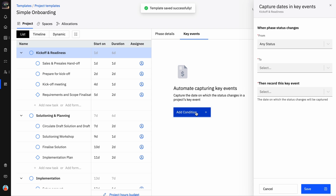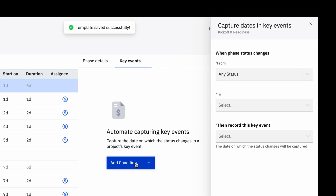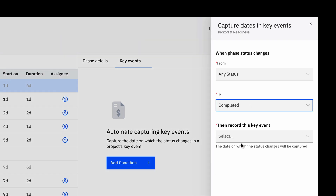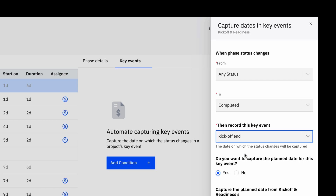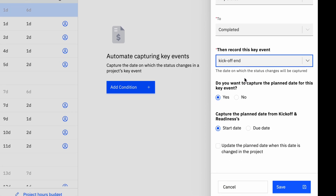Under When Phase Status Changes, add the From and To statuses. For example, record the key event when the status changes from Any Status to Completed. Under Then Record This Key Event, choose the key event for which you apply this condition.